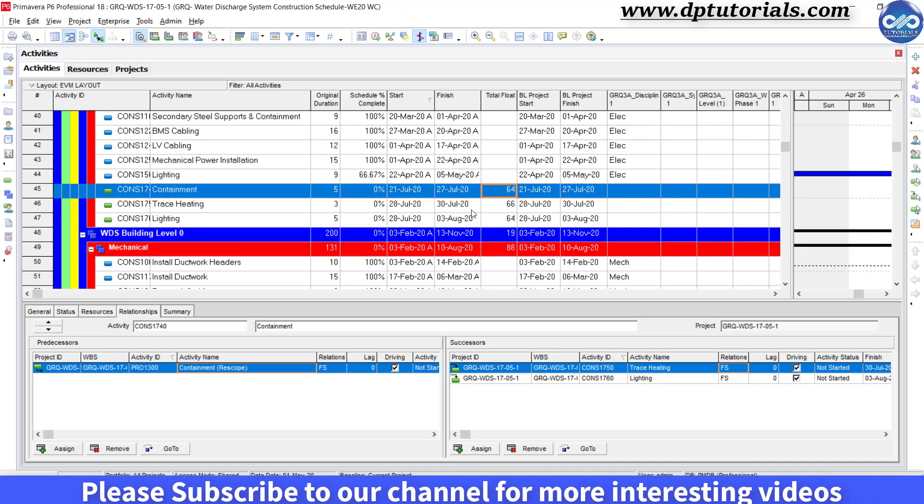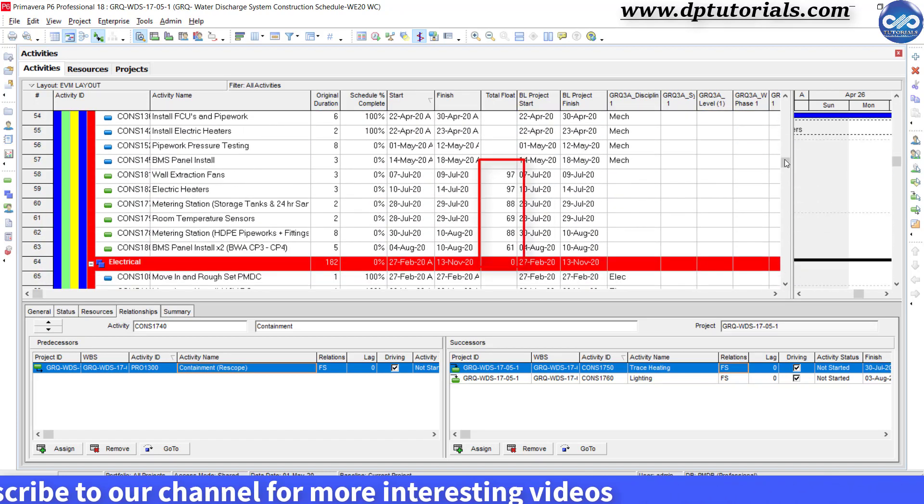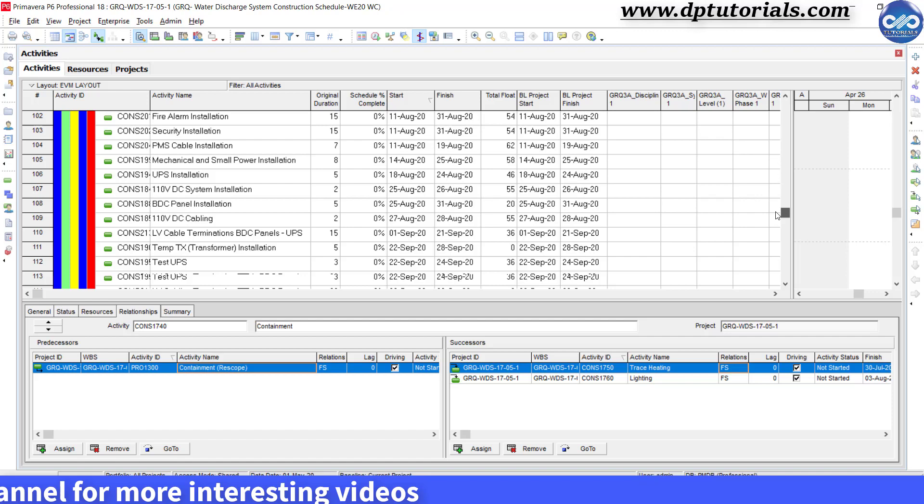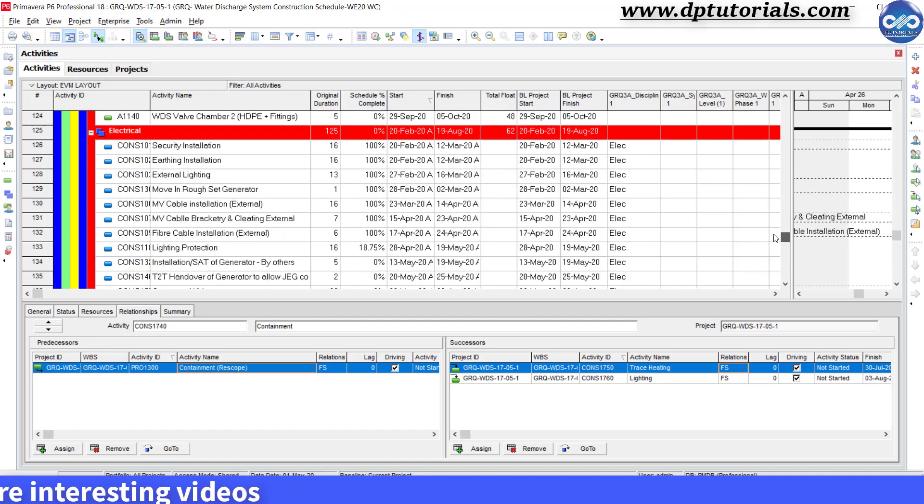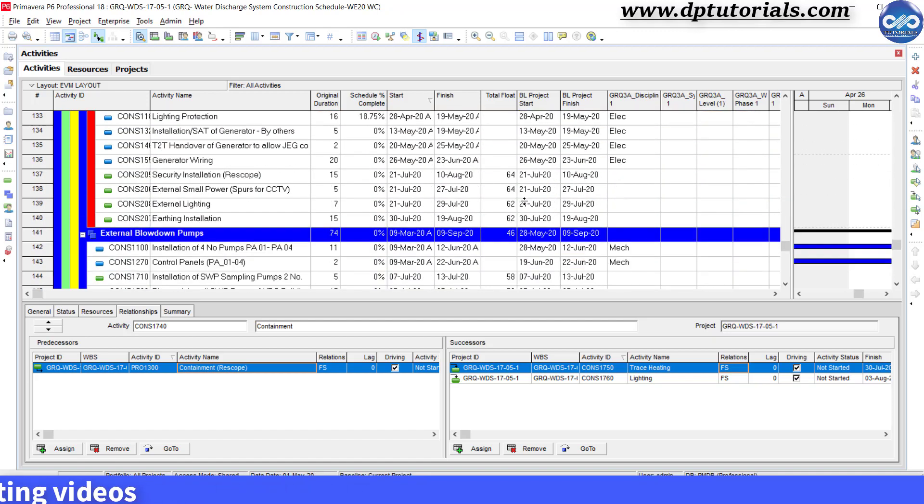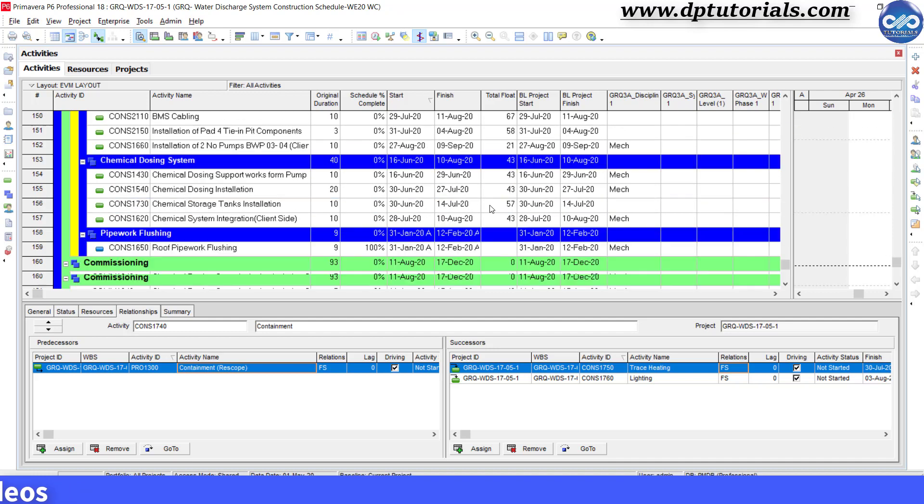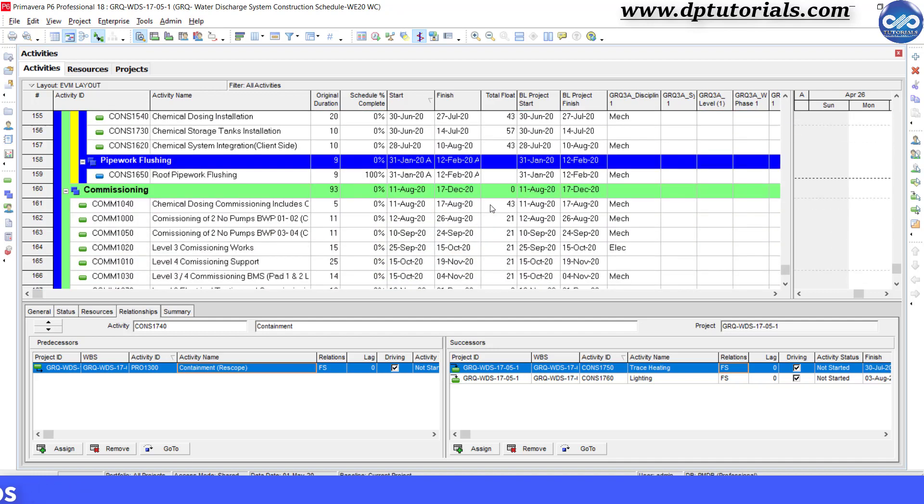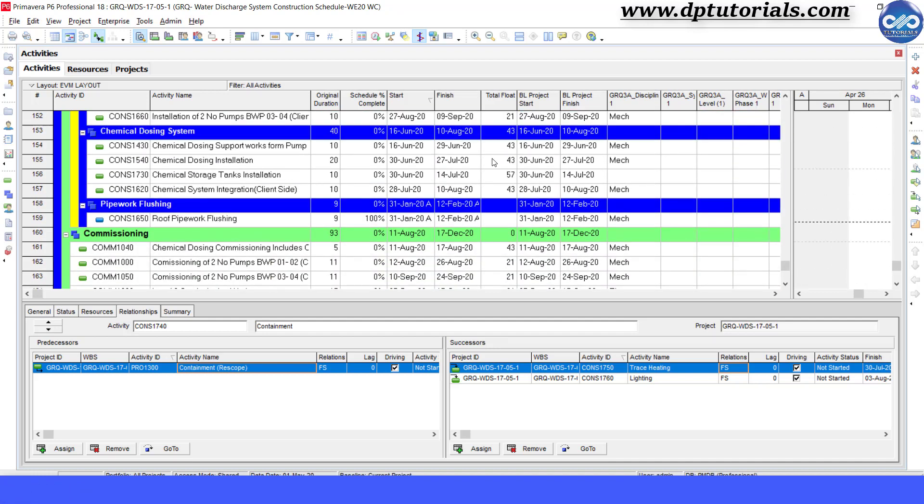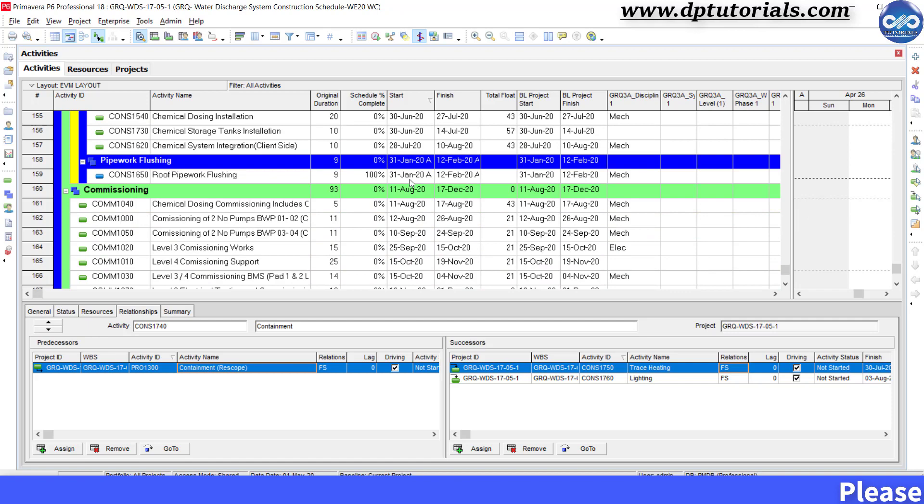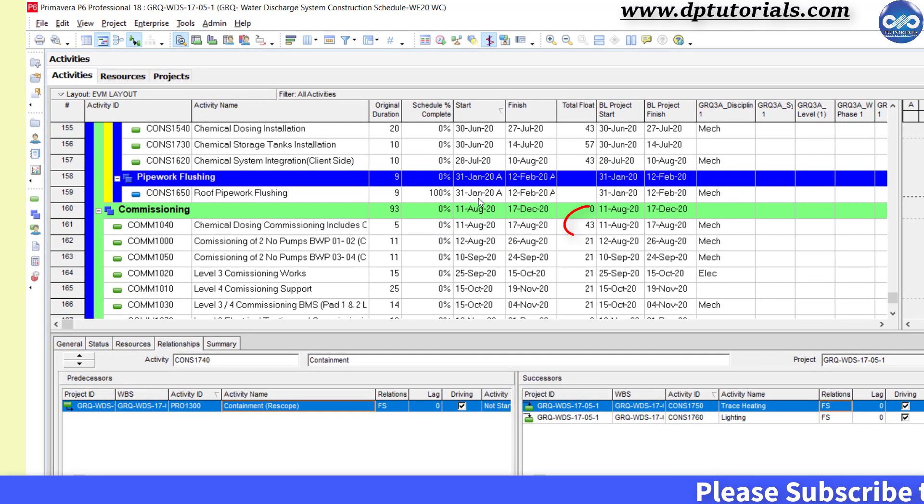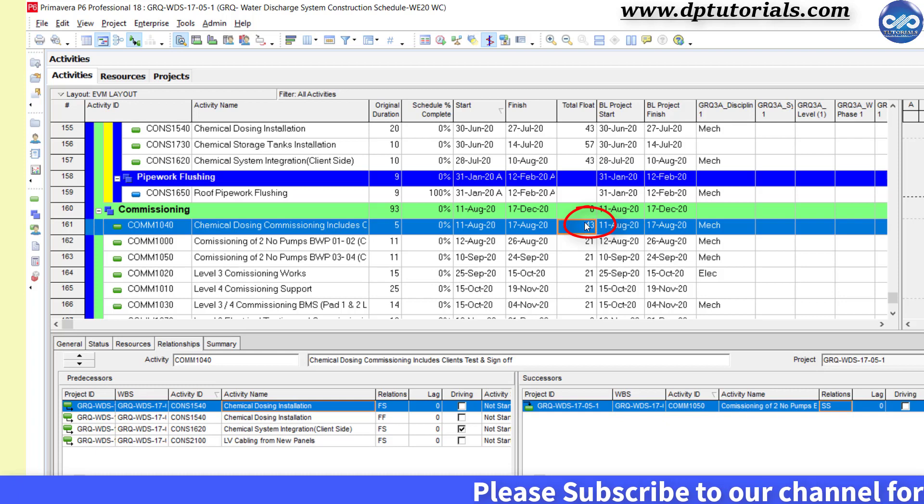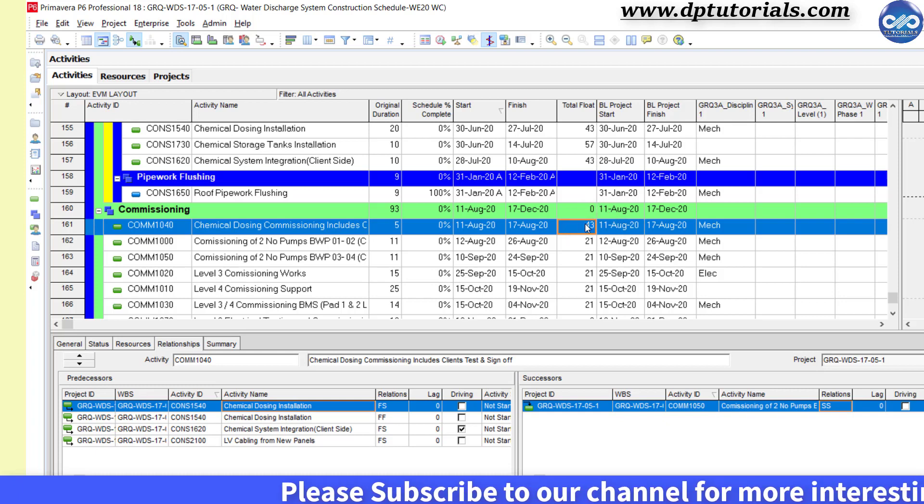Then the quick solution which needs to be carefully executed is to add more logics which would make some sense rather than creating conflicts. Here, I have got some more logics discussed along with the team and upon agreement, I am adding more relationships like this. For example, this activity which has got 43 days of total float, I am linking the new successor.